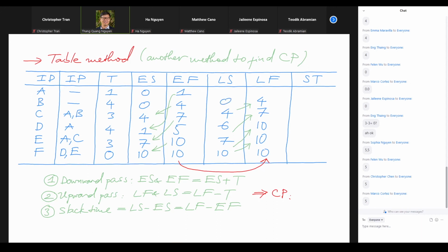It is the same result that we got earlier. And finally, we ask ourselves, where does A go to? A goes to C, A goes to D, and A goes to E, right? A shows up 3 times. So we have 3 candidates, 4, 6, and 7, right? And obviously we have to choose the 4. And then we backtrack to have 3 here, right? So with that, by the way, we have that 4 because of that 4.